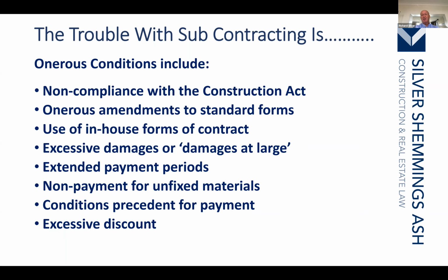It may include for extended payment periods. This is again relevant to the Construction Act. So check when you are going to be paid. Some people say that the final date for payment shall be 2 years after the due date. Suggest you don't accept that. Subcontractors, you need to establish if there is payment for unfixed materials and where the job is delayed, possibly for materials off-site.